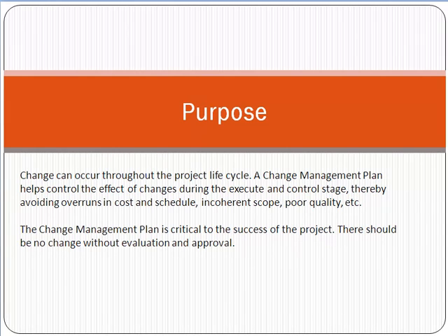Also it is very important that no change could be evaluated or implemented without approval. For example, if you are implementing a project for a mobile app, and you have to give 5 modules, and then one stakeholder says that one more module is required, there should be a change control board. Senior management should be involved, and the impact on time, cost, schedule should be evaluated and should be signed off by the customer, that these are the impacts on these factors.